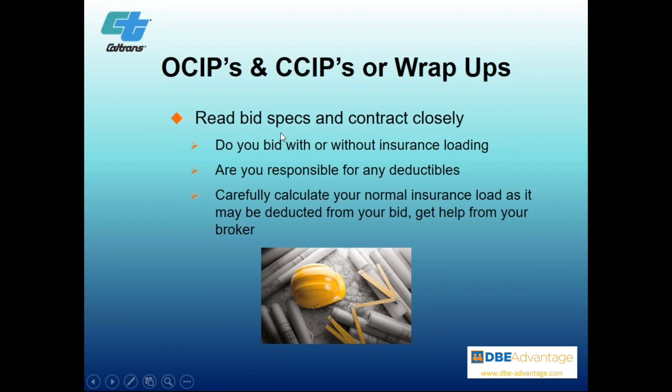But reading them is the key. It's a lot of paper. The more you read them, the more you understand how they set up their systems. But you want to make sure that you don't bid without this insurance loading. You want to know what it is so you can put it into your costs. There are deductibles that you have to put money away for in case there is a need. You want to carefully calculate your insurance load necessary for any bid that you're going to make,